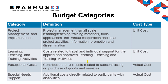Before we move on to recording your organisation's spend, here's a reminder of each budget category specific to a KA229 project. Both the Project Management and Implementation and the Learning Teaching Training Activities budget headings are funded on a unit cost basis — costs fixed by the European Commission. Exceptional costs and special needs support are real costs, meaning any eligible pre-approved claims will need to be supported by invoices and are reimbursed at the rates specified within the programme guide.